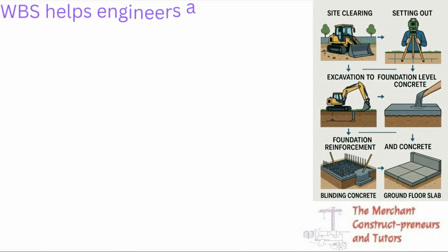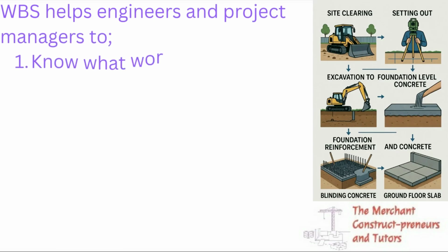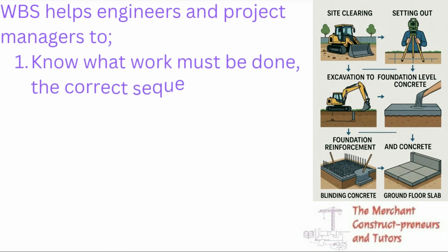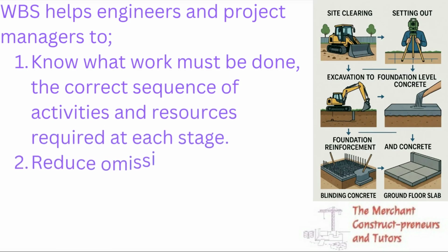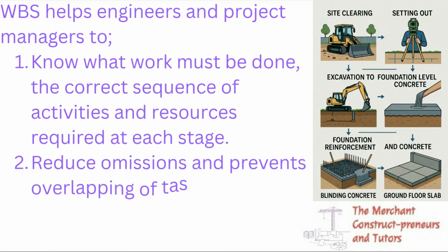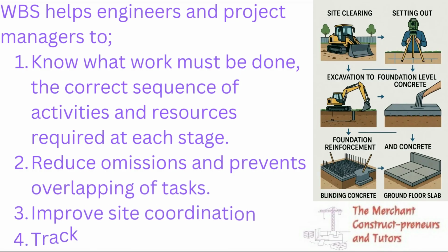So slide one: why a work breakdown schedule? Why do you need to prepare it? A work breakdown schedule helps engineers and project managers to know what work must be done, the correct sequence of activities, and the resources required at each stage. It also reduces omissions and prevents overlapping of tasks.